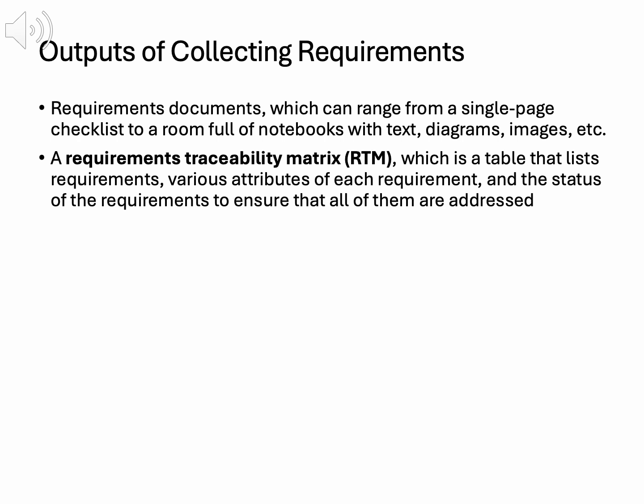The documentation ensures all requirements are clear, guiding course development and preventing misunderstandings. The second output is the Requirements Traceability Matrix, RTM, a table that lists each requirement, its attributes, source, and status. For example, a requirement for executive-level courses might be traced to steering committee input, marked as complete once developed. The RTM ensures no requirement is overlooked, linking needs to deliverables and maintaining accountability. These outputs are essential for scope control.